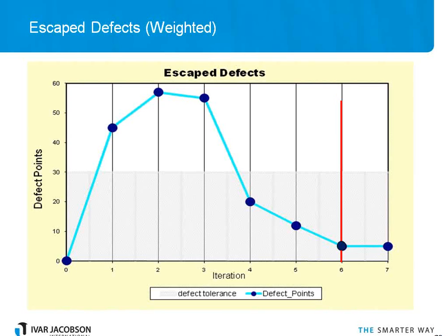So just to summarize with the escape defects measure, what we're looking at is those defects that were not fixed within the iteration that they were found. That's why we call them escape defects. We don't want to punish people for taking a test-first approach and being rigorous in recording the defects they found when they ran those initial tests.